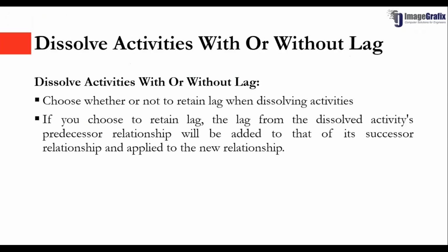Going back to the next feature, the next feature is dissolve activities with or without lag. Primavera P6 has a built-in operation called dissolve activities that allows us to delete an activity without deleting its relationship. We will see what dissolve activity is in the coming slide.